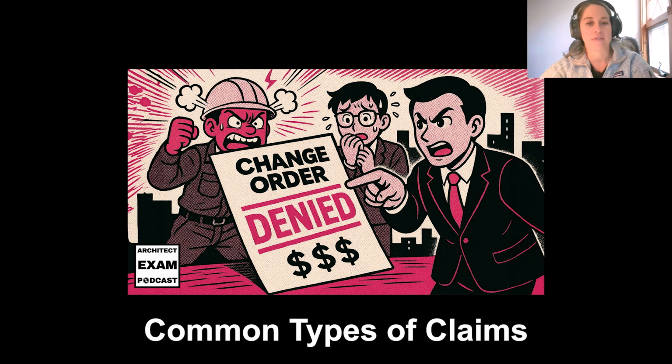We never want any of those to happen to us as architects, but it's good to know that they can happen. So next, let's review claims against the contractor. There can be workmanship issues, which are common claims against the contractor. This is when the contractor has a failure to meet the specifications, or there is poor quality installation or non-conforming work that they've completed. The contractor can also have delay claims, which arise when contractors fail to maintain the construction schedule or don't provide adequate manpower to complete the job, or maybe they poorly coordinate the different subcontractors across different trades together.